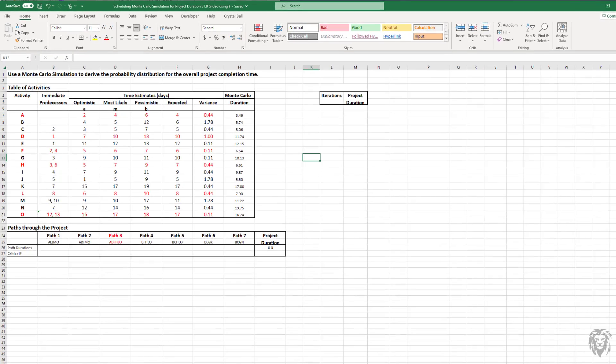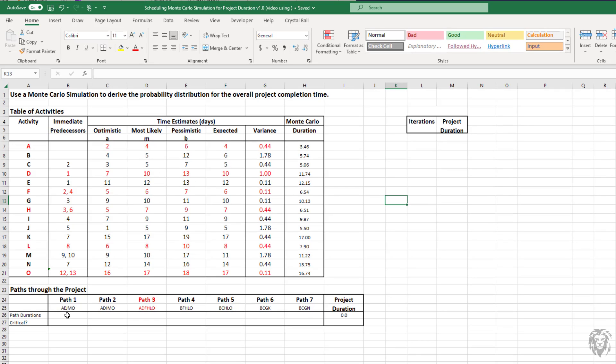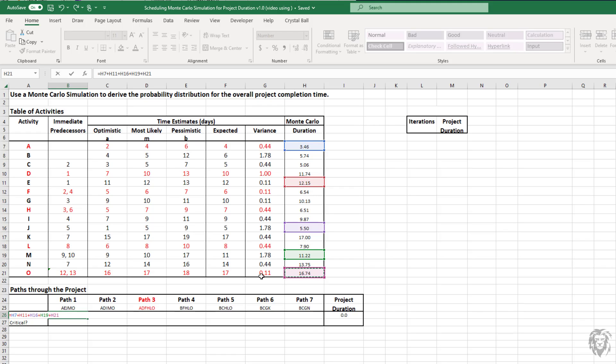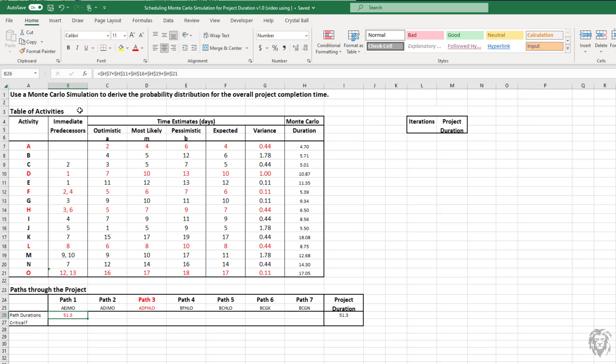I'm going to figure out a duration for each of the possible paths. I'm going to have to do that more or less manually. So I'm going to say equals A plus E. Line that up, choose E and J and M and O. Now I'm just going to turn those into absolutes. I'm going to use my function F4 to turn them into absolutes so we don't have any issues later on. We have our path duration calculated for path one. That's a bit painful, so I'm going to go ahead and put those all in for paths two, three through seven, and we'll come back just as soon as I have those done.